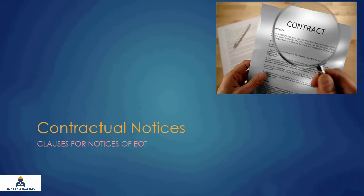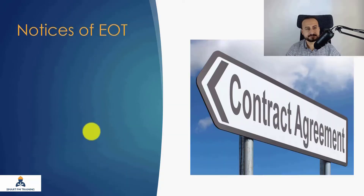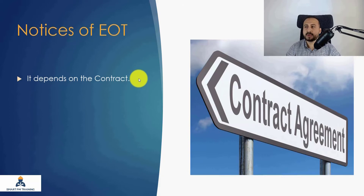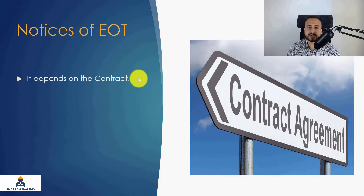We are starting Section 2, which is related to the relevant contract clauses for extension of time and how to identify events. In this lecture, we will talk only about the clauses for the notice of extension of time. The notice always depends on the contract — 99% of all contracts require a notice of extension of time, because the client has to be prepared for any potential risks in project completion. Most contracts will defend and protect the client from any EOT risks, which is why notice is normally required under any contract.